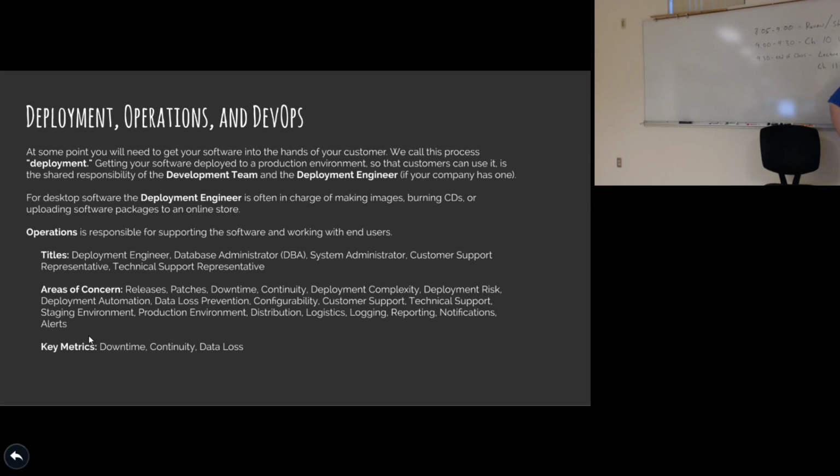Once every 2 weeks, all representatives from each team would meet, led by a business person. At each meeting, you would tell what changes you would like to make to the database 2 weeks in advance, and then it would be approved or denied based on conflicts and so on.